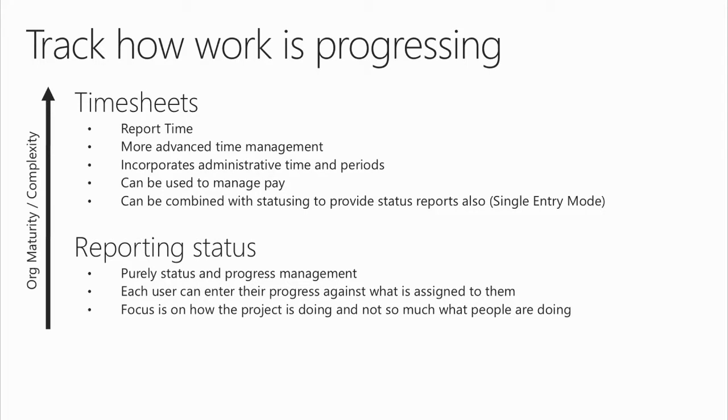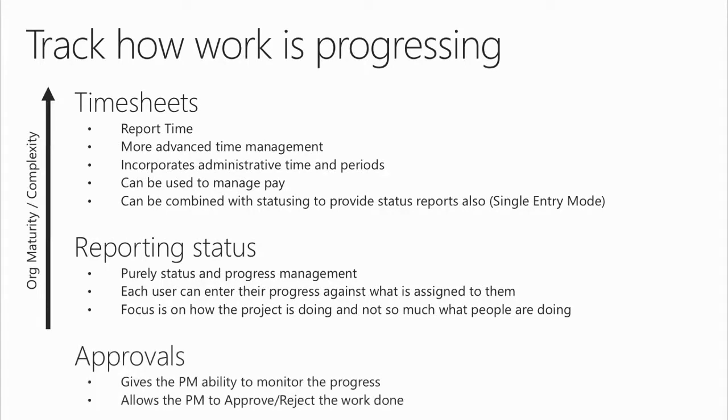If your company needs them to be the same thing, if you need to bring them together, there is a single entry mode where, if you enter stuff in timesheets, that also gets applied to the project and rolls forward into the status of the project. But otherwise, they're separate from each other.